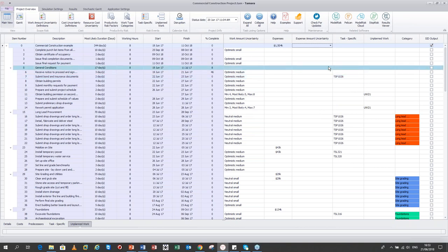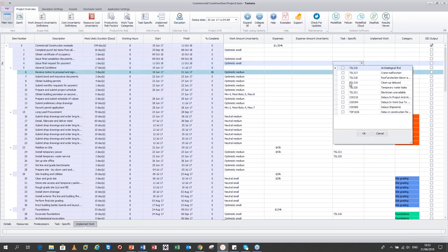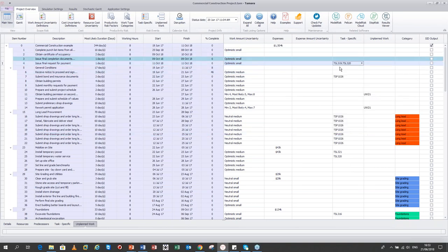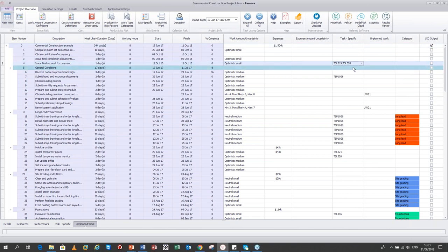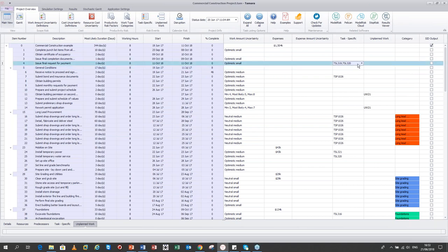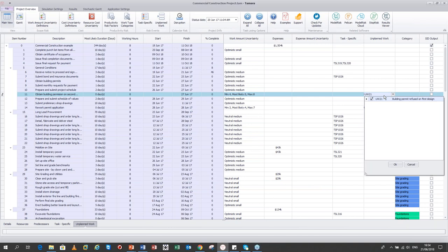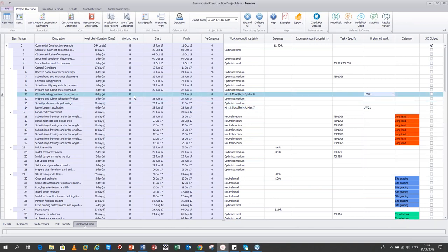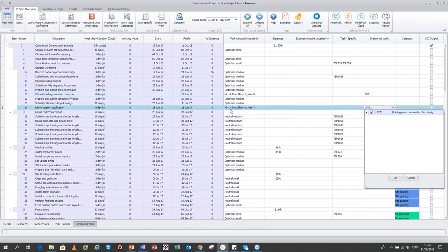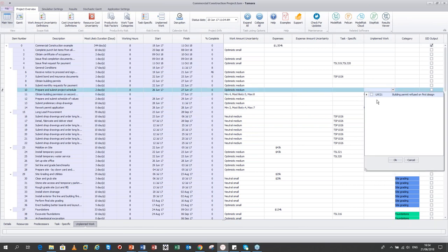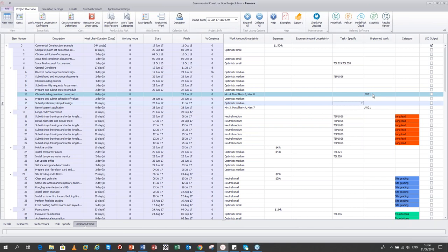Unplanned work is modeled by building a risk event — for example, 'building permit refused.' If this risk fires, the zero-duration tasks that represent the extra work switch on: one takes a minimum 4, most likely 5, maximum 8 days, another takes minimum 3, most likely 4, maximum 7 days. Both switch on simultaneously when the risk fires — with a 30% probability of occurring — and this additional duration affects the downstream schedule.